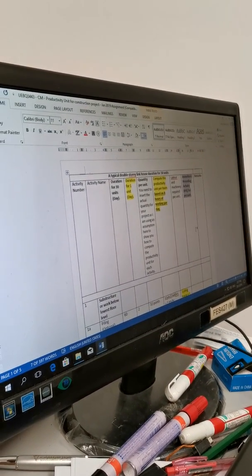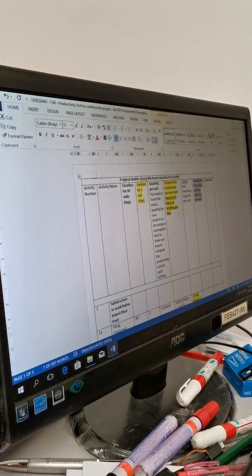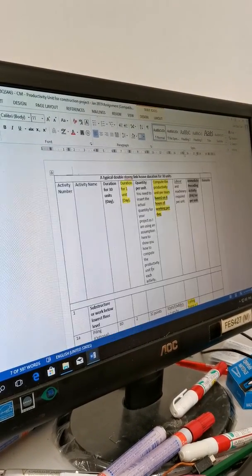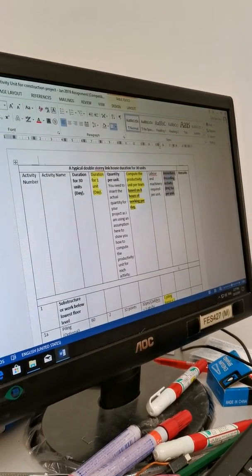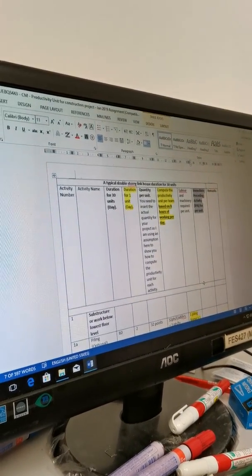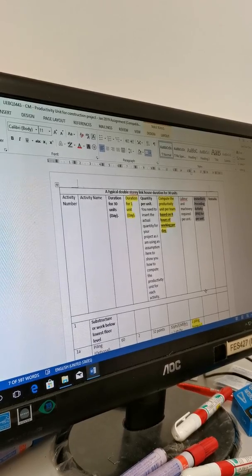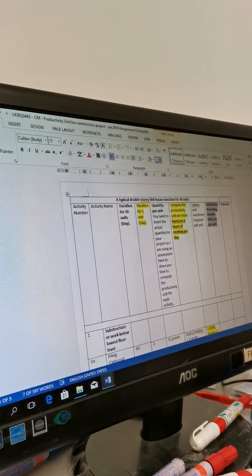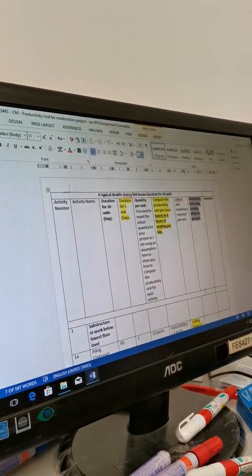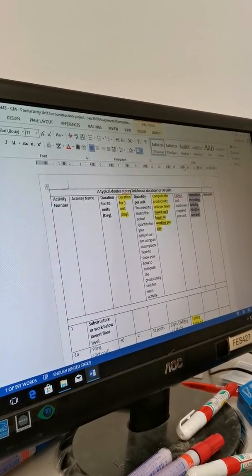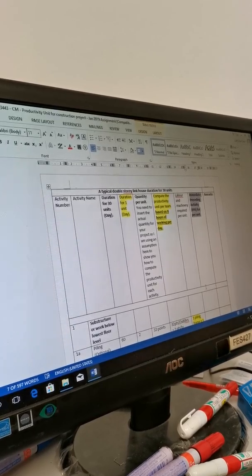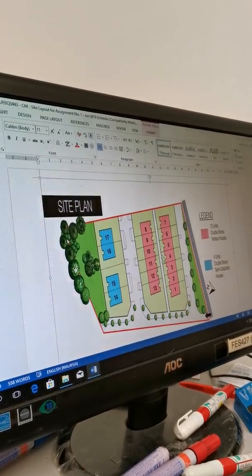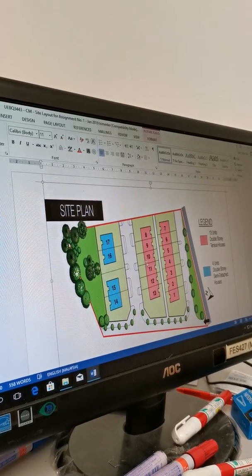If you're talking about your layout, it so happens that this one is 17. Whatever figure I get after doing all this and transferring it to your AON and graph paper, that item's figure will be times 17 for your labor requirement. Machinery requirement is not times 17. It's under how many blocks. So the machinery requirement for this particular person will be times 3.